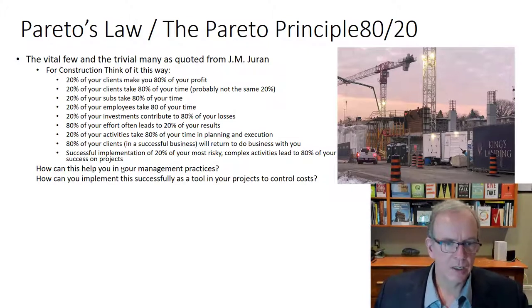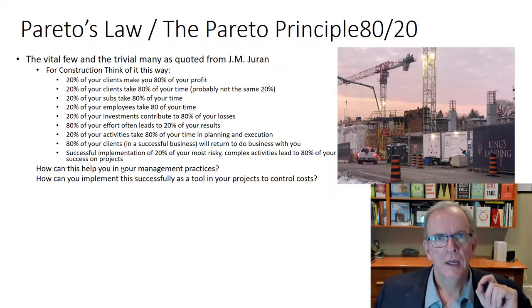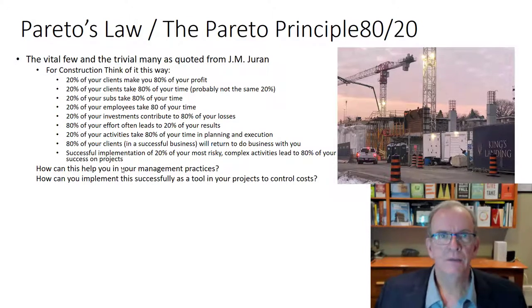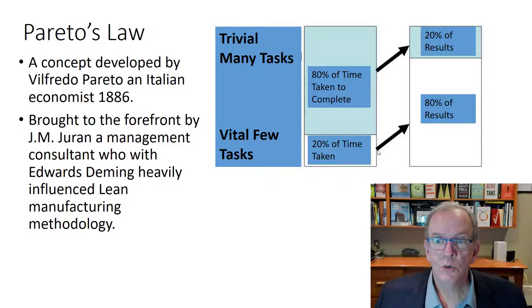But on any project, there are certain things that you think are technically complex. So that's giving you a flag. If it's a case of ambiguity, where it's not clear, we can pilot it, we can test components of it. Or if it's something that is larger, we can put extra effort into that planning process. We can bring in better expertise so we can clarify some things. So we put extra effort into those areas, and going back to the chart, that's going to lead to us being successful in this project.